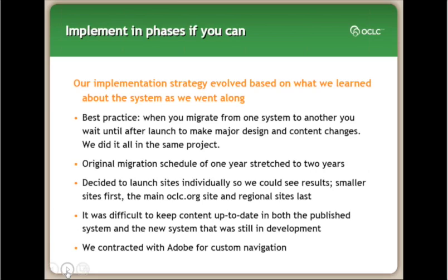One mistake I think we made, and we were advised against this, but we really wanted to do it because the site design was fairly old, about 7 years old. When you migrate from one system to another, wait until after you've done the migration to worry about doing a redesign or a lot of content rewrites. We didn't, and it really piled on a lot of stress. There was still rewriting going on after we'd migrated and a lot of cleanup.